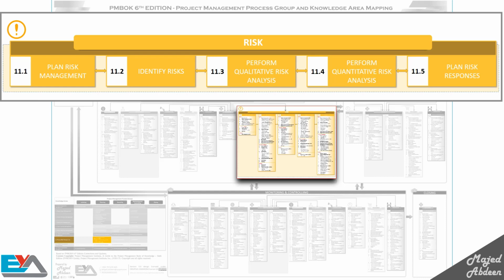For qualitative risk analysis, you will assess the various risks and their impacts from purchasing from each company. For quantitative risk analysis, you will assess numerically the chances that you will need customer support for the tool. You will look at how many people purchase a tool but don't need help, and how many purchase it but have problems requiring customer service support.